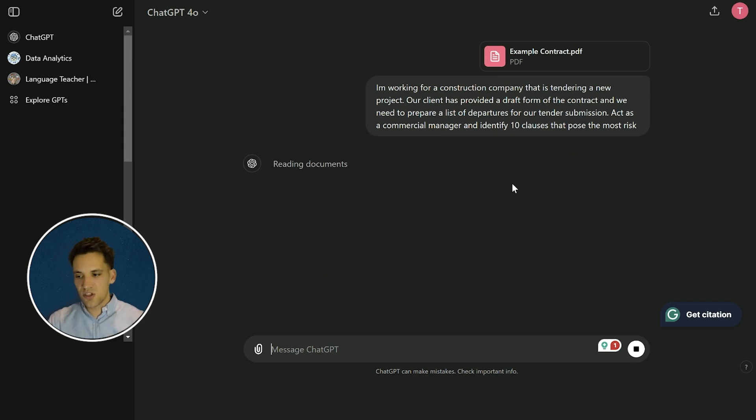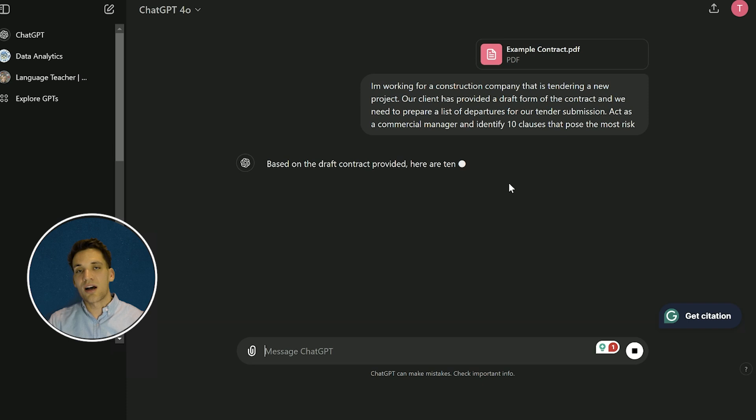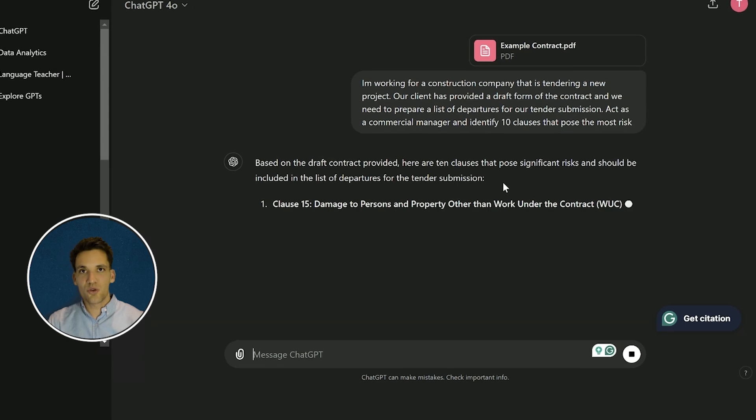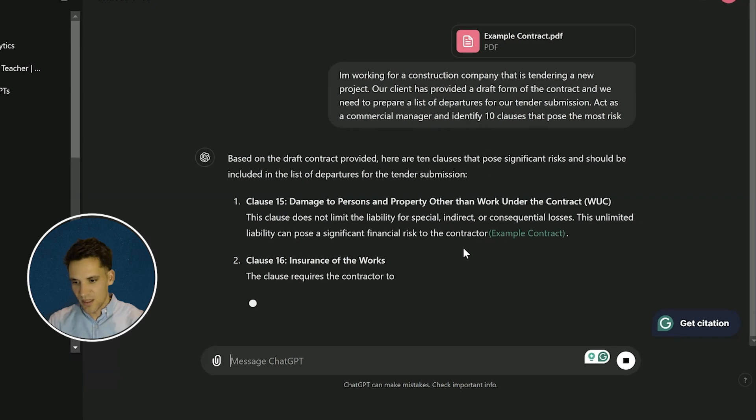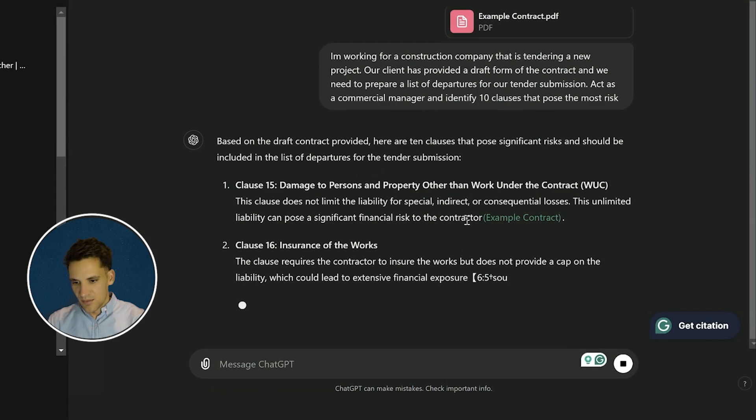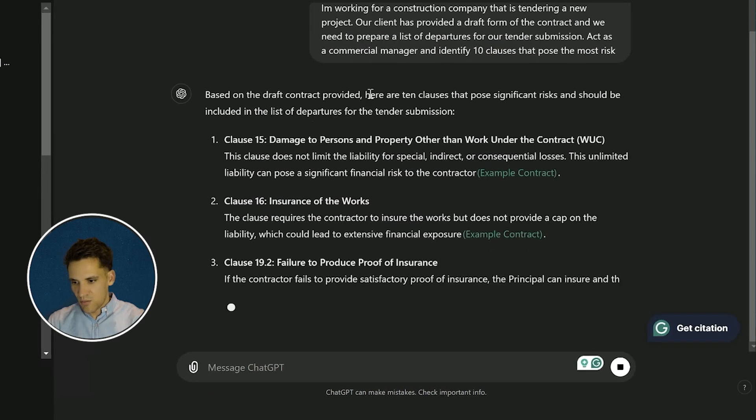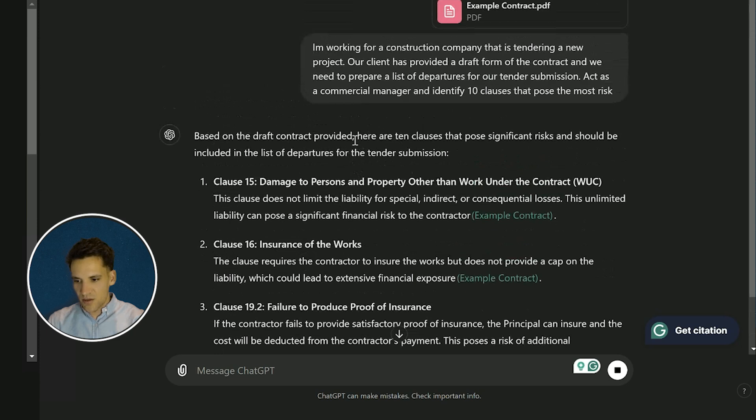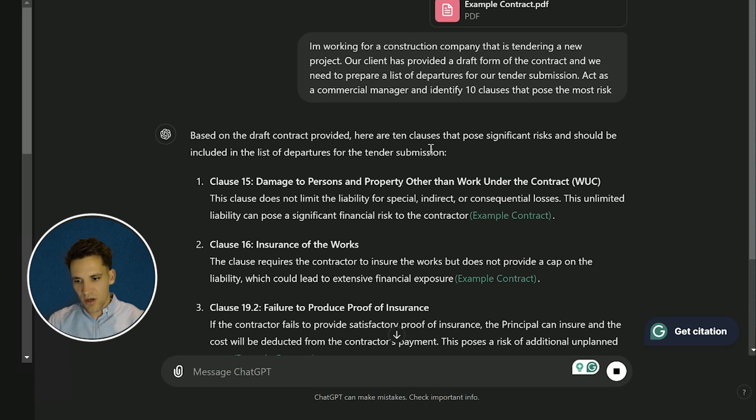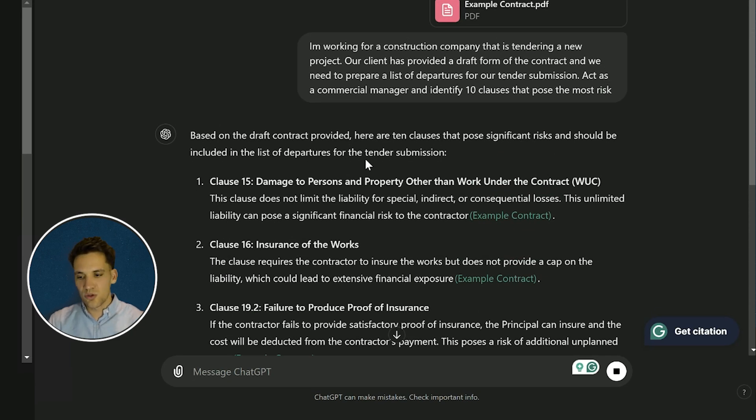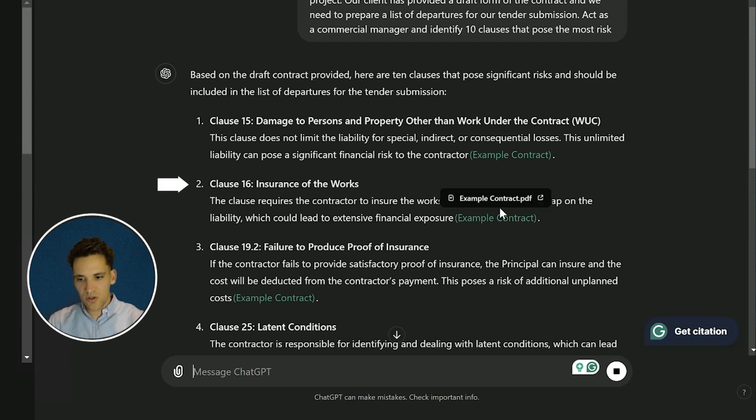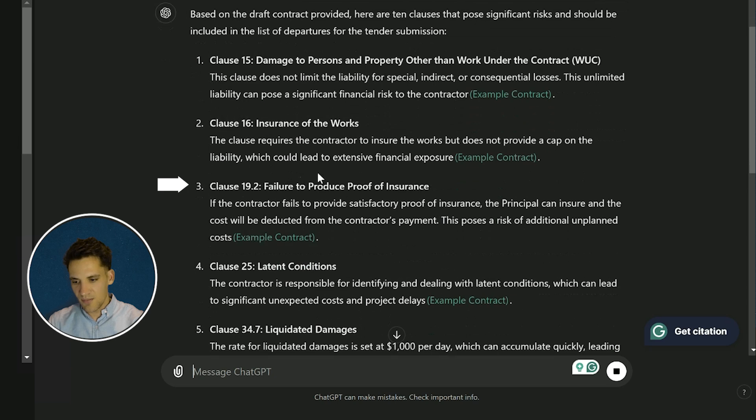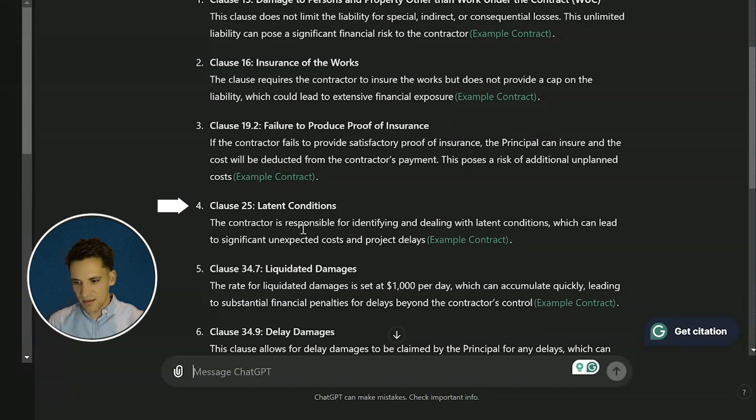ChatGPT is going to review the document and advise 10 clauses it thinks are most risky. Based on the draft contract provided, here are 10 clauses that pose significant risks and should be included in your departures list. Insurance of the works - the clause requires a contractor to ensure insurance but does not provide a cap on the liability. Failure to produce proof of insurance.